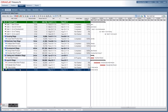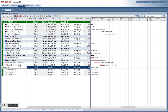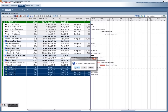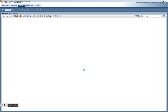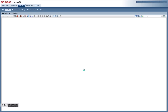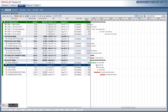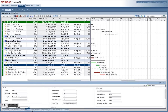Easily enter information into your project schedule by pressing the insert button, creating a new activity, naming your activity, setting a duration for it, and establishing relationships between other activities and scheduling it out. You can edit information from the Gantt chart or enter it into the tabs at the bottom, such as the general tab where you can enter a planned duration.